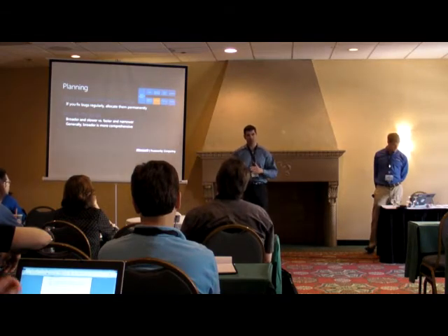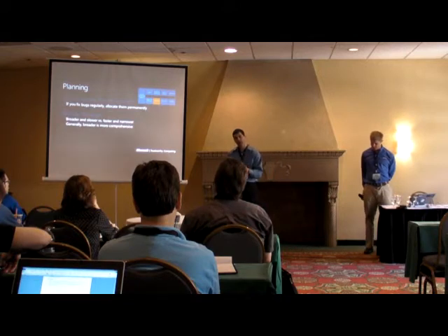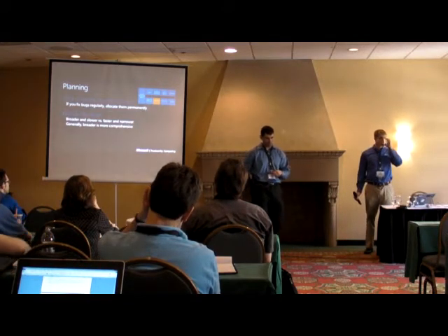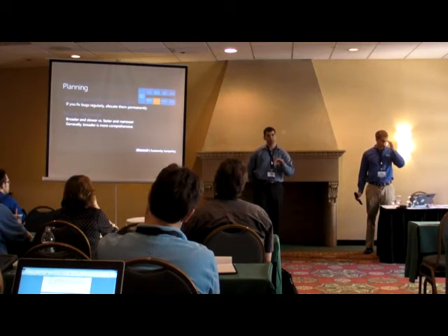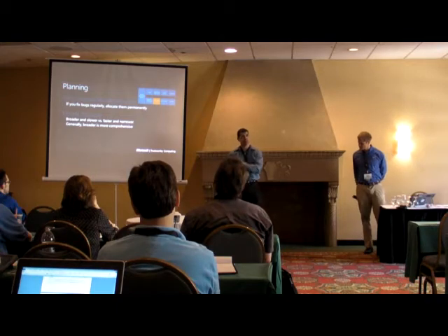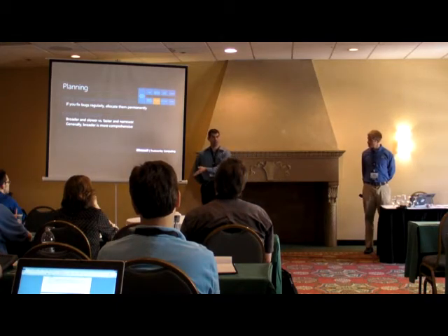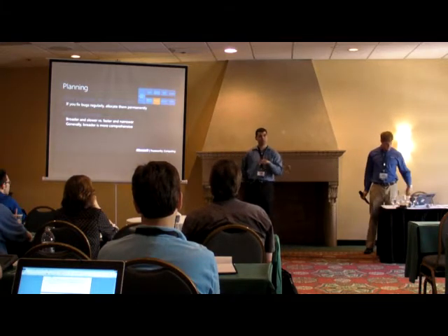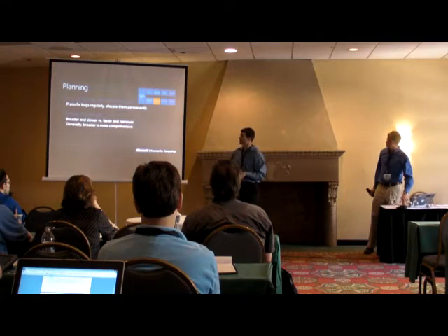What are all the variants you're going to be looking for in terms of the same code path, variations of the file format, so on and so forth. So you want to properly define the scope, and the bigger the scope, obviously the longer you're going to take to service the vulnerability. You may not have 3 years, right, to go scrub all your code. You're only going to have a short, finite amount of time, so you need to properly identify what that scope is so you can actually make your target.